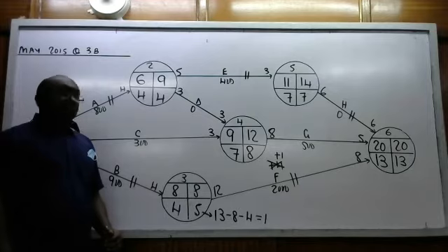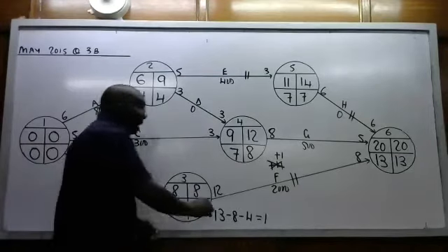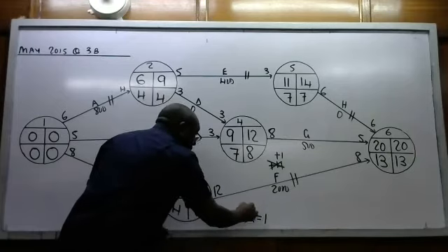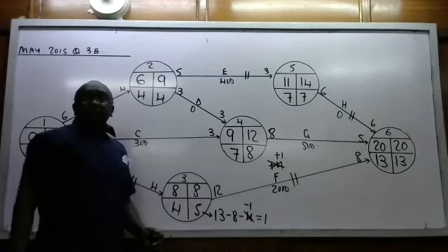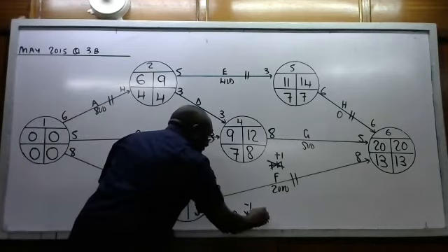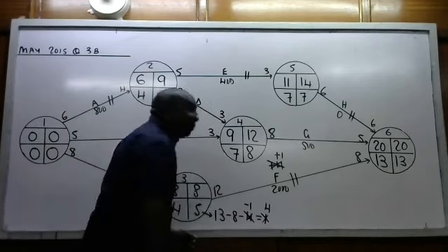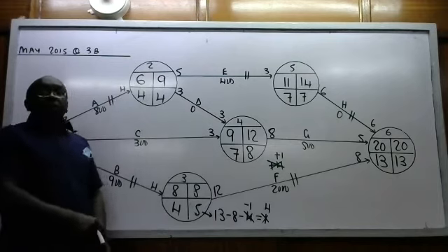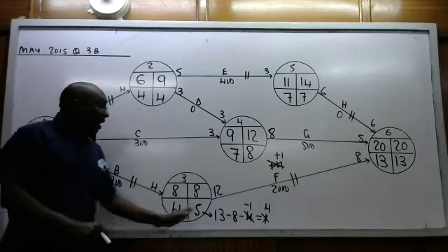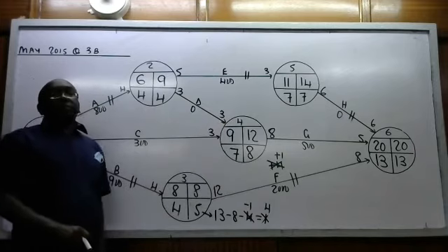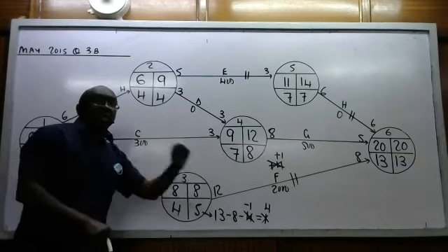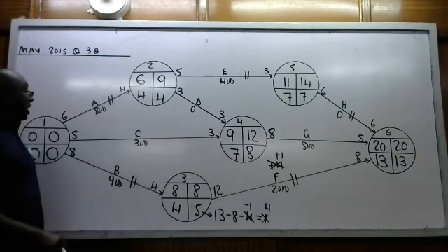Return back 1. Then we come back here, we say instead of subtracting 4, we are supposed to subtract what? 1. And instead of getting 1, we will then get what? 4. So B will do the 4 days. Immediately it finishes, F takes over. So we can only afford to return 1 day. Higher. Let's go to the next one.